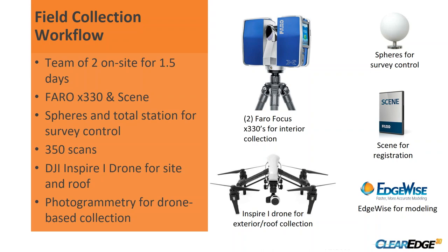You get to the project site, you start to get oriented, and you have two guys there. They can start to troubleshoot. They can change around the plan really quick. And then when you start leapfrogging, you start ending up with a lot more efficiencies with your setup. So you're actually a lot less setup time, and you start to kind of play off each other. And I would say it's almost about 2.5 times as fast to use two people at once than it is just a double multiplier. So we use Faro scanners in-house.